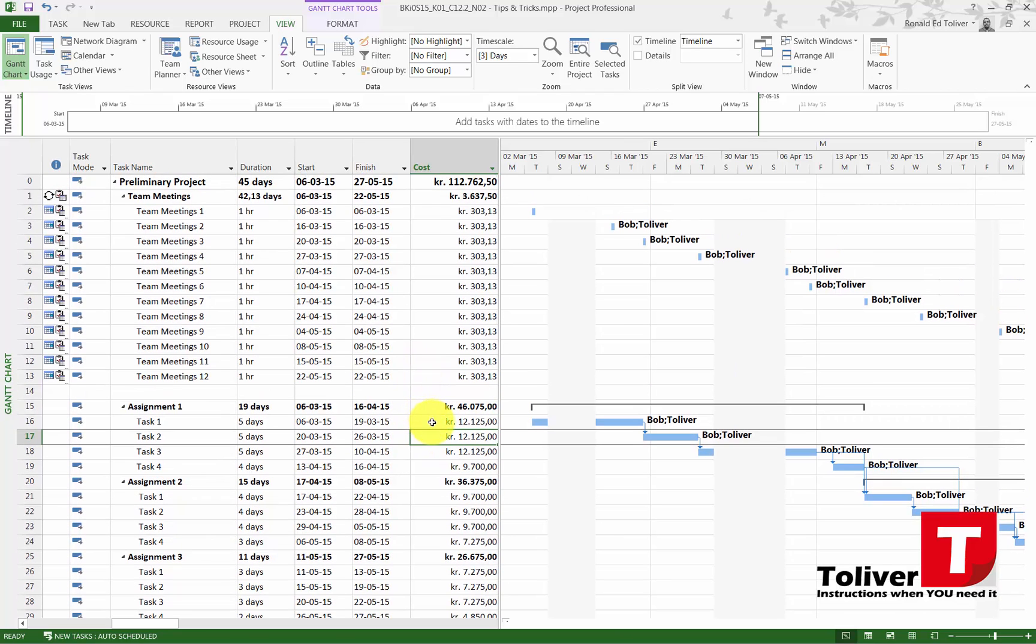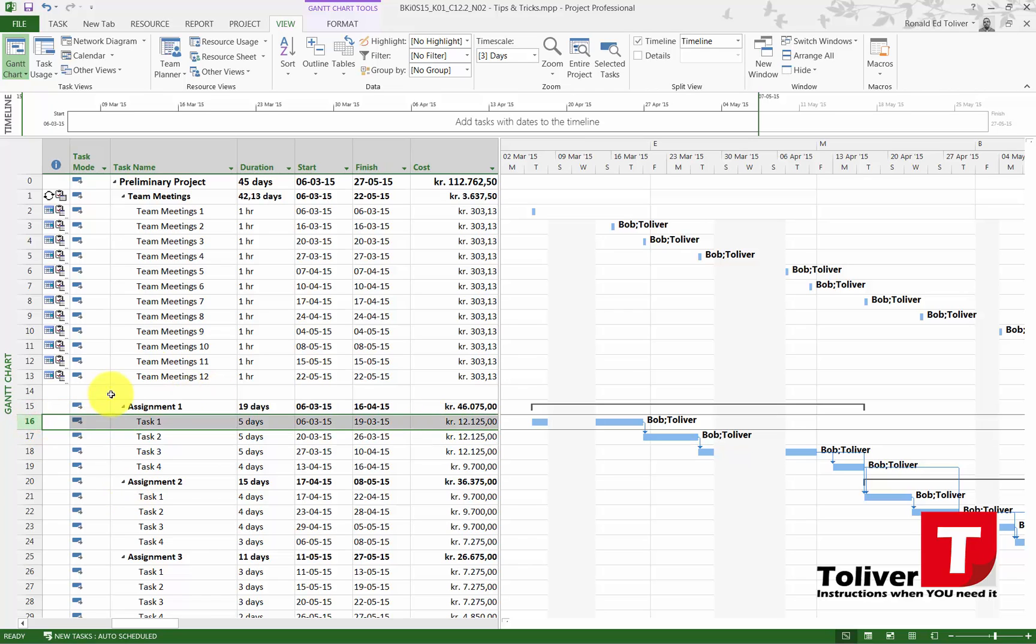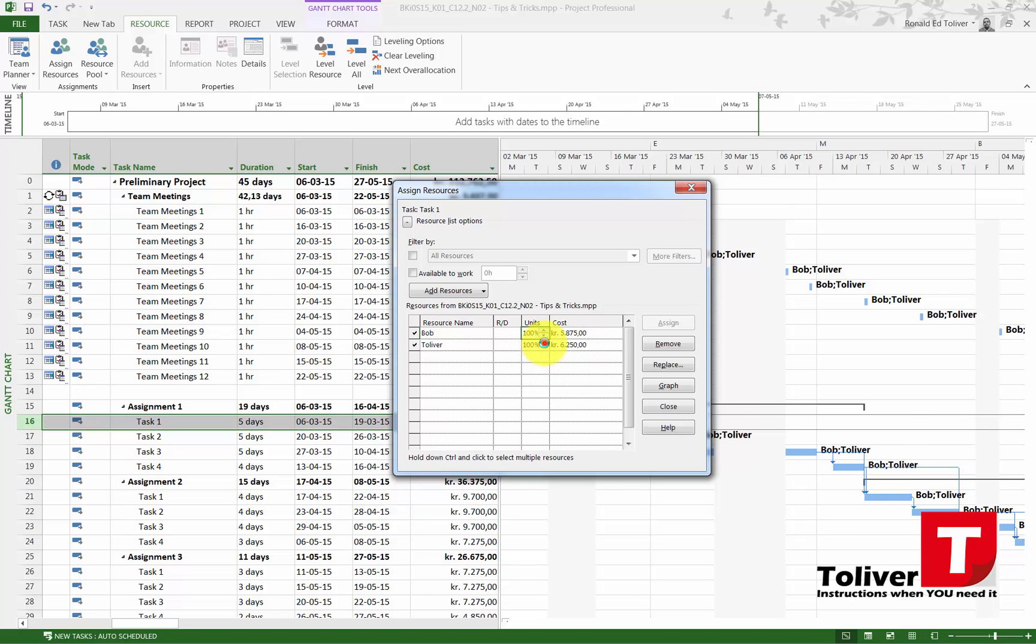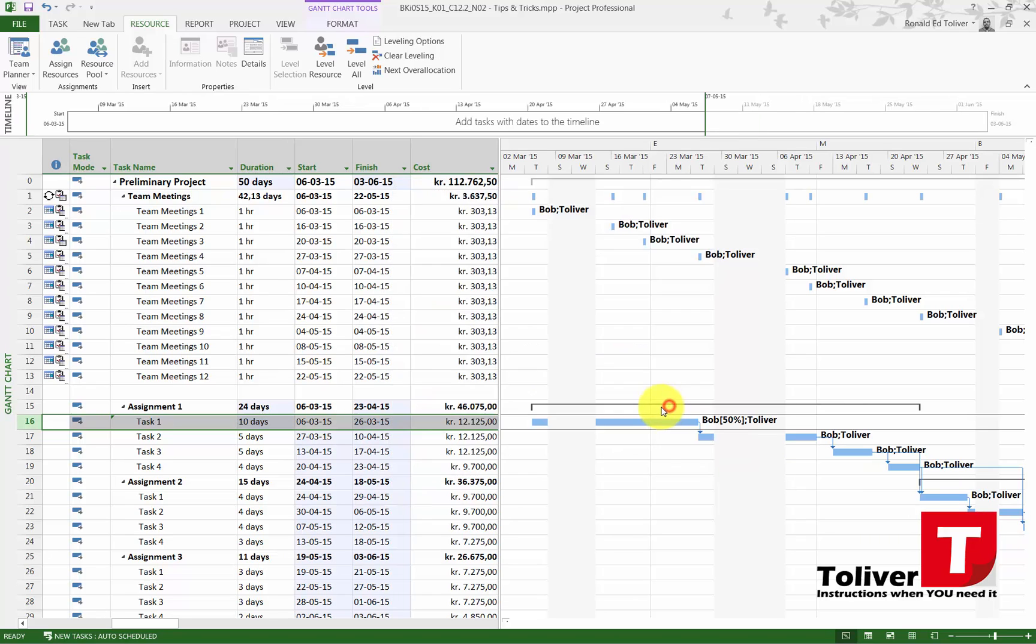I could pick this one task, Task 1, go up under my resource assign resource and say well Bob, you're only going to be working 50% on that one. Close.